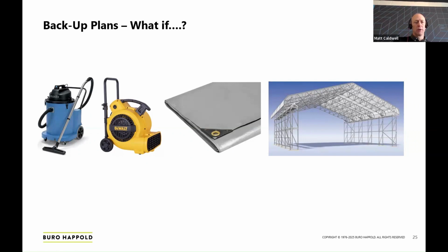Some of it's quite simple, just access to wet vacs and fans, some tarpaulins. Maybe you've already contacted some scaffolding suppliers and you've got a quote and an idea of how you would enclose that building if you needed to. It just means that when you have a problem, you're not scrabbling around at that point. You've already got some plans in place, and you can just put them into action.